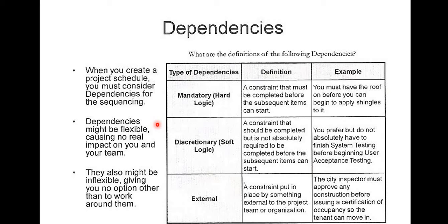So the next one, which is not on this slide, is internal dependency. This is a constraint that happened within the project organization, yet it was not foreseen. So, for example, a sudden removal of a project team member could be a constraint for the project. Let me quickly use this extreme example. A sudden death of a key project member. Now, this will be a major constraint because now this guy will not even have time to do handover documents to the next guy.